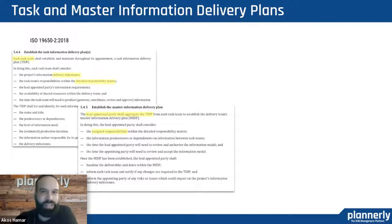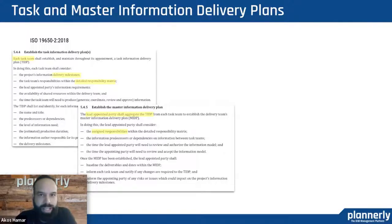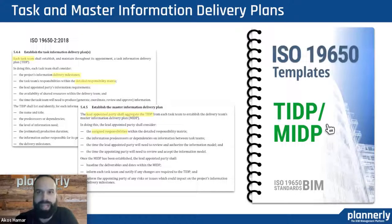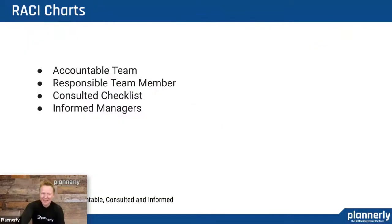TIDP, MIDP — the task and master information delivery plan. To put it in very simple terms, this is a task list. Each task team assigned a certain activity would put together their to-do list and how they are going to execute those tasks — that would be the task information delivery plan. The lead appointed parties — the ones in charge of bringing things together — can assemble what is called a master information delivery plan. That's a set of task information delivery plans combined, and that's going to be the way of carrying out the project. And yes, we happen to have a template for that.